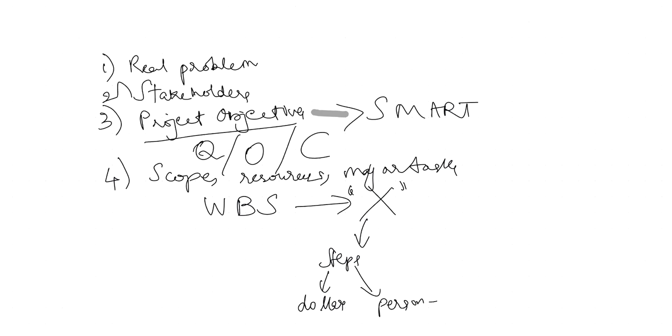You need to follow the hierarchy structure. Generally, a WBS typically consists of 3 to 6 levels of subdivided activities. The more complex the project is, the more levels you'll end up having. As a general rule, you should not have more than, say, 10 or 20, unless it is an enormous project that really needs to be a single umbrella, so you need to think through it. And don't worry about the sequence of activities while you're planning the WBS, especially in the build-up phase.